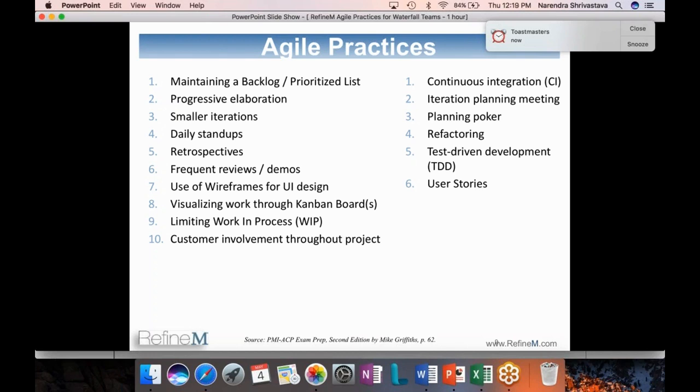So normally in a 2-week sprint, when you have completed the planning for the sprint, you don't bring in any change during the sprint. Your changes are in between sprints. So when the sprint is over, you can go back and look at your backlog and see if you want to. And I will explain some of these as we go along.